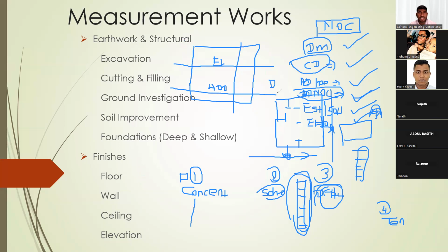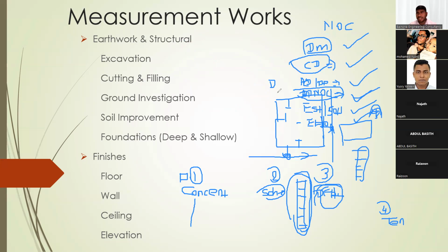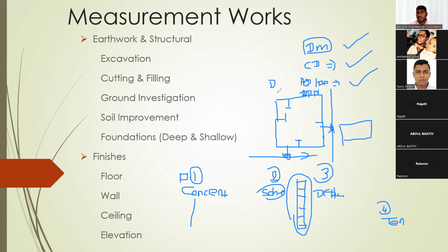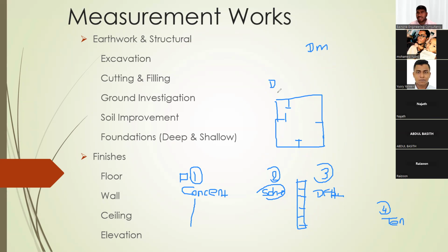Then he tenders out, the contractor prices the tender. Then after that, during the progress, client comes and says, instead of 40, I cannot accept this 40. I need to go a little up to 50. Then that change, what he brought, of course, is a variation.